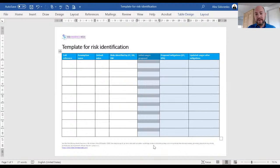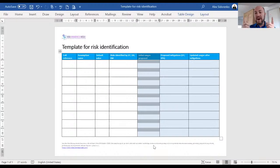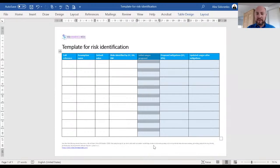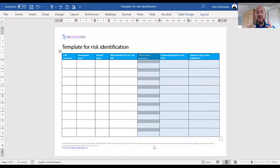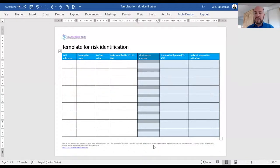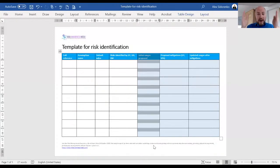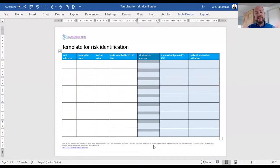Here, we use the risk information to propose an initial range for each of the assumptions. And this is the time when we run the initial simulation using Monte Carlo or whatever other technique you prefer. We run the simulation. And because we have all our inputs as ranges, we now have all our outputs, our decision criteria as ranges as well.